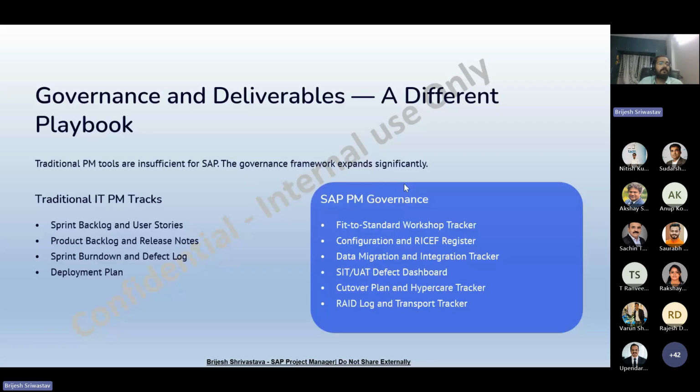They ask questions based on the checklist, and based on the answers you provide, you can also involve a business user, because overall you are going to implement. You can call the business PM, because if there are questions you are not able to respond to, the business PM can respond. So you can involve them on that call, and once you complete the impact risk assessment, you will automatically get a notification during assessment of whether this project's impact is high, critical, or low risk, what kind of project.